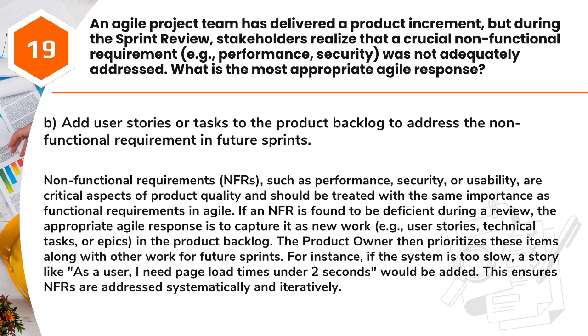The product owner then prioritizes these items along with other work for future sprints. For instance, if the system is too slow, a story like, "As a user, I need page load times under 2 seconds," would be added. This ensures NFRs are addressed systematically and iteratively.